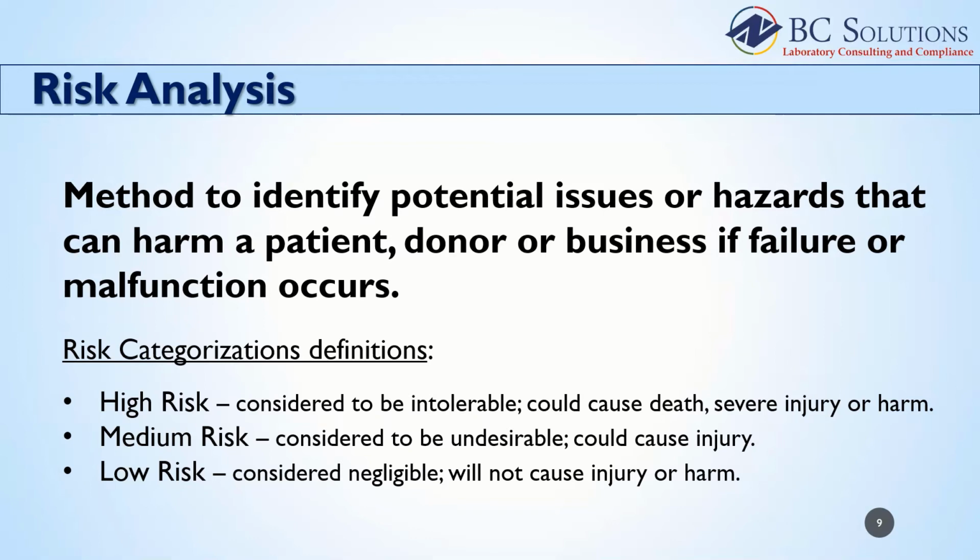system. To focus your validation, you need to do an assessment on your system functionality so that you can be sure you are validating the highest risk items or those areas or functions that have the most potential to cause harm to patients, donors, or business.